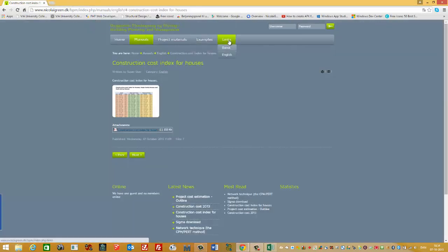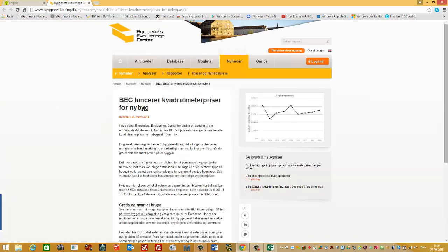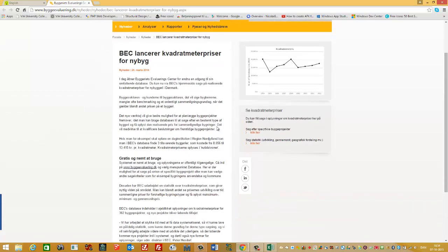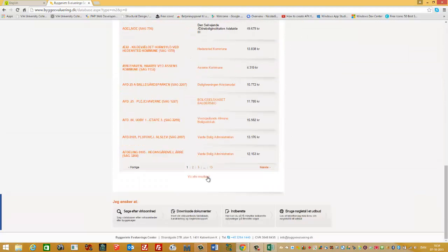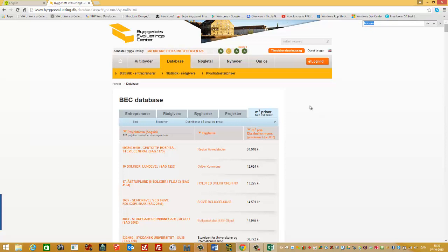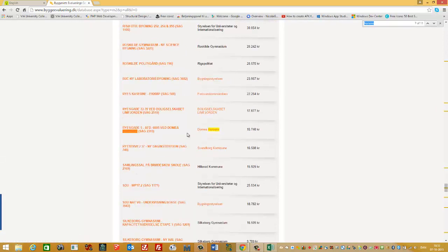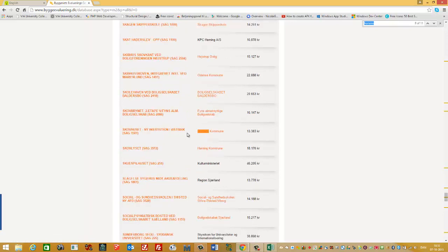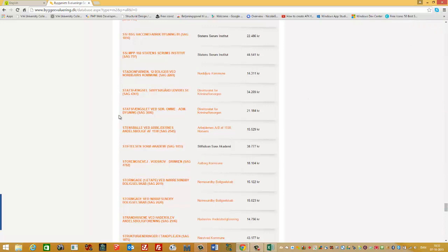I go to Links. And here's a link for square meter prices. It's in Danish, but I hope you can use Google Translate. Here you can search for specific building projects. There are a lot, but I need to show all results. Then I could use Ctrl F because then I can search inside the document. I could search for Horsens. Here is Steensbälle in Horsens, that's close to your plot. And here I can see I have a square meter price of 15,529 Kroner. So this is also a way I can compare the square meter price.